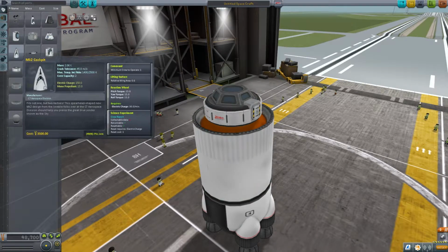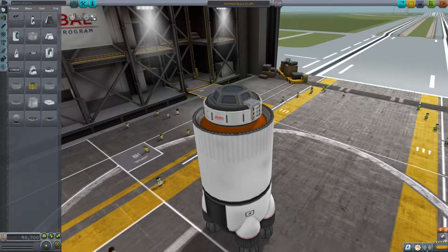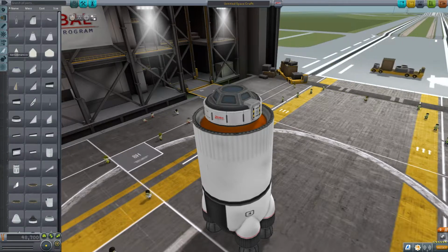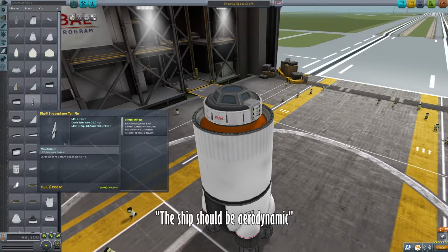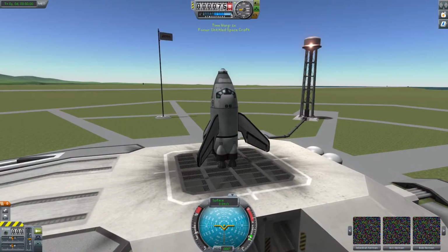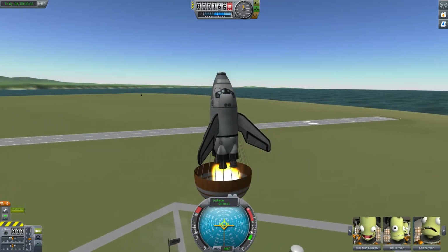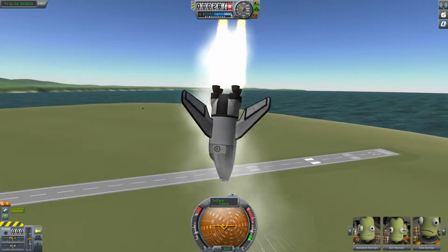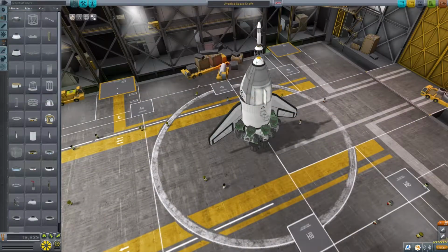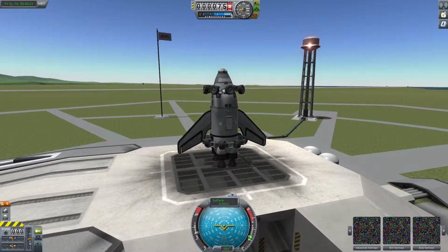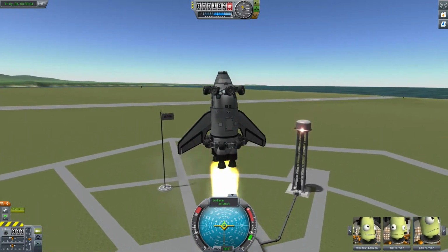Prototyping leads to a handful of interconnected features, and perhaps our imaginary developer here is familiar with project management methodology like Agile Scrum, so they're defining user stories and scrumming and iterating and getting a lot accomplished. After some time, they've got a basic working prototype of a game and things are looking good, but the game doesn't quite feel done, so they begin to consider what the game needs in order to be finished, and they add another feature, which in turn adds to the game but still isn't quite enough to finish the game off, so they have to add more, and continue adding until eventually the game has gone from feature-rich to feature-bloated.